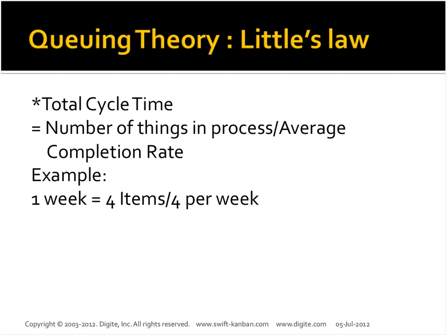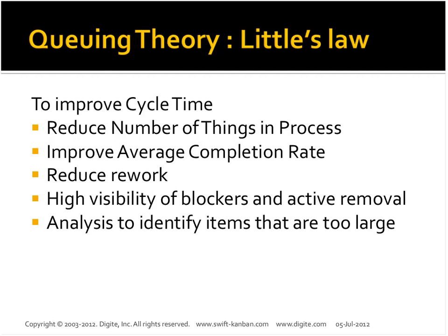The whole idea of limiting work in progress also has scientific evidence. You could read up on Little's law, on how the number of things in progress delays the overall cycle time for a particular feature or overall in the system. So if you've been doing 4 things in parallel, it might take much longer for each card to get done, rather than if you picked one card and delivered it end to end and then picked up the next one. We'll quickly go over this to save time.